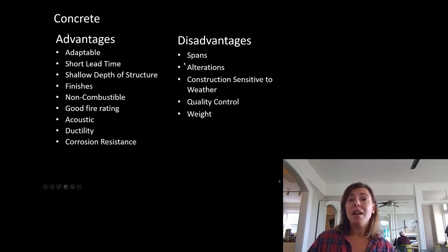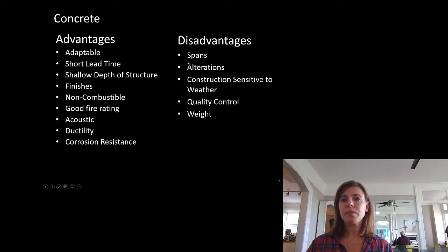But that's what makes concrete hard to deal with for alterations. I'm sure they've had a lot of people just blow holes in concrete walls, not thinking of structure. And so they just have a firm policy of why you can't do that without an in-depth analysis. So I kind of get where they were coming from. It's because alterations are hard in concrete buildings.